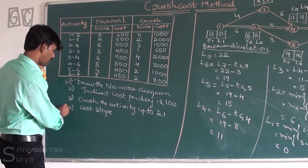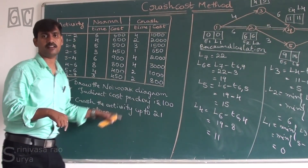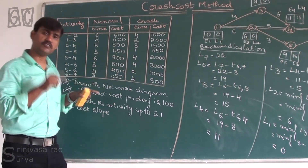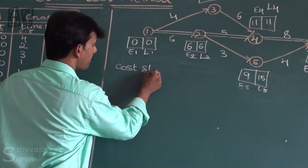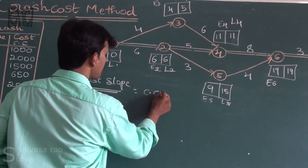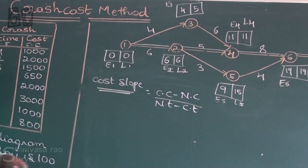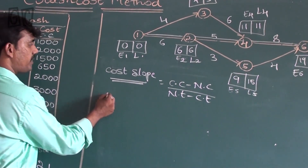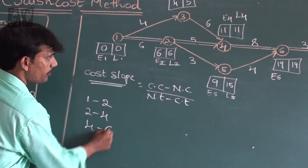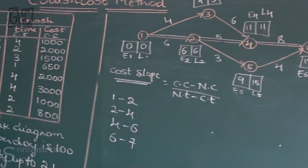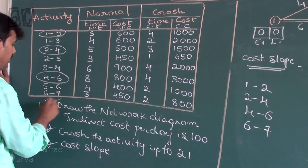Now I want to teach the cost slope. The indirect cost per day is 100 rupees. We need to crash the network up to 21 days. The cost slope formula is: (Crash Cost minus Normal Cost) divided by (Normal Time minus Crash Time). We consider only critical path activities: 1 to 2, 2 to 4, 4 to 6, and 6 to 7.